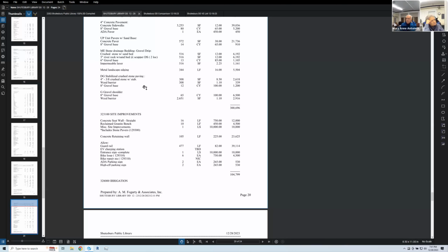$73,000. The caveat with this number is that there's going to be a markup from the utility company. Currently we have a job number in with them to just get electrical to the property line, and then our project is going to run the duct bank into the property. Whereas if we now go to overhead, they actually take over the installation of the overhead poles into the site. So there's a markup that we would see from them for that, and I haven't been able to get that to you yet. Our electrical engineer is asking that question. So this 73 number wouldn't be a true swap. You can probably figure it'll be between $7,000 to $10,000 a pole coming into the site.